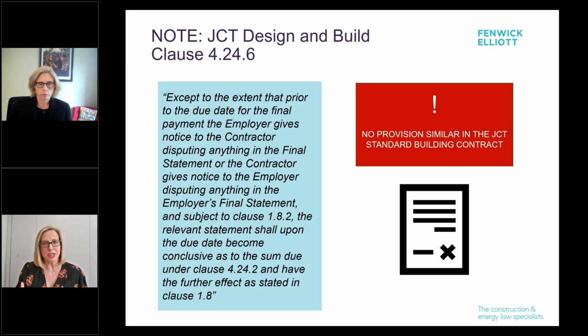Now there is a little exception to the commencing proceedings under the design and build contract. Clause 4.24.6 says that clause 1.8, as we've discussed regarding conclusivity, operates as normal unless either party gives notice that it disputes anything in the final statement prior to the due date for final payment. So unlike commencing proceedings, which under clause 1.8 has to happen within 28 days after the due date for final payment, either party can give notice disputing the final statement between that statement being issued and the due date for final payment.